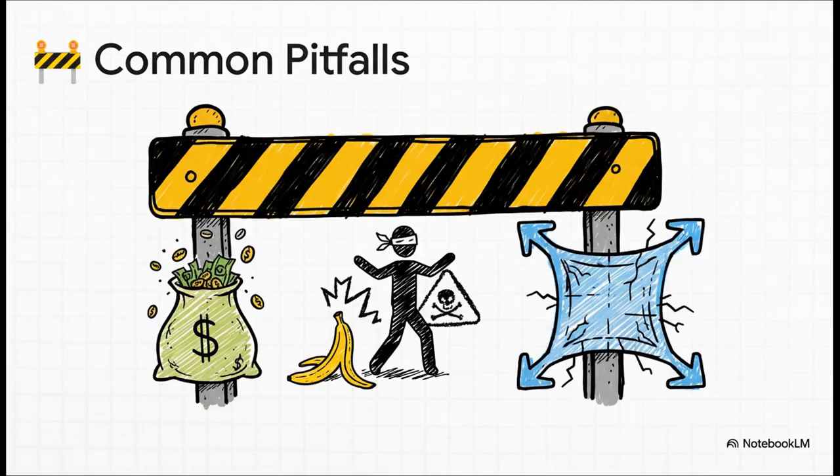And on the flip side, here are the traps that can sink a project. Like we just said, padding. It just destroys trust and makes it impossible to know what the real numbers are. Forgetting to formally account for risk isn't being optimistic, it's basically gambling with your client's money. But maybe the biggest killer of all is a poorly defined scope. If you don't know exactly what you're supposed to be building, there's no way you can know what it's going to cost. Always remember, scope creep always leads to budget creep.